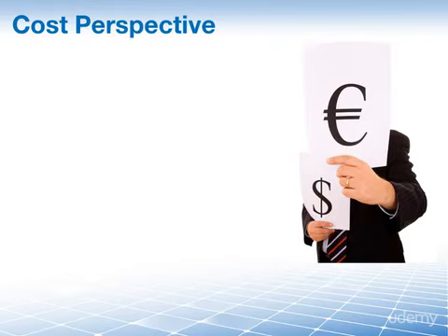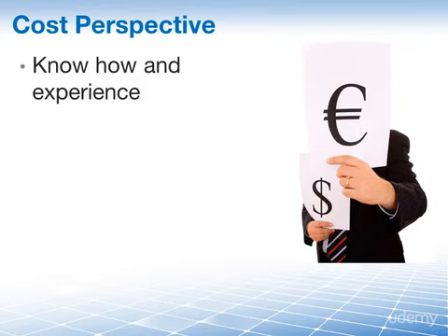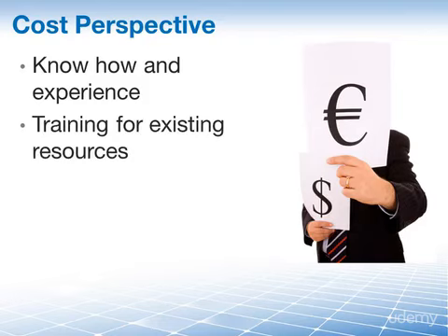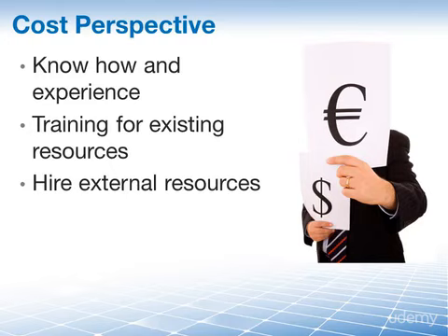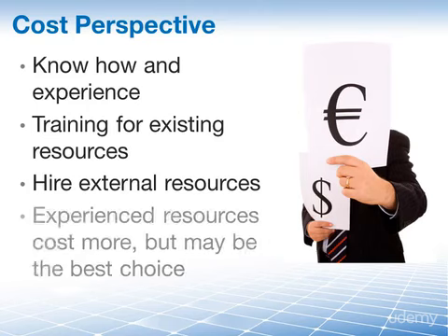But there's more to cost than just simply the hourly rate. Know-how and experience are also connected to cost. If your resources don't have the appropriate know-how to perform a task, you must send them to be trained, and that costs money. Or you could decide that it's overall cheaper for you to hire external resources with this particular specialized know-how. Remember that the more experience a resource has, the more the resource will usually cost.